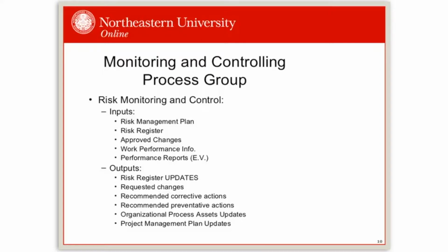So while these updates are critical to the success of the project, it's important to remember to follow the integrated change control process established at the onset and complete change requests as needed to accommodate changes in the risk landscape. Recommended corrective and preventive actions will likely trigger change requests, such as addressing contingency plans and workarounds. And so it is important in your risk monitoring and controlling that you're really talking about that so that the